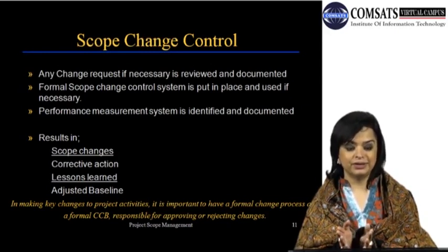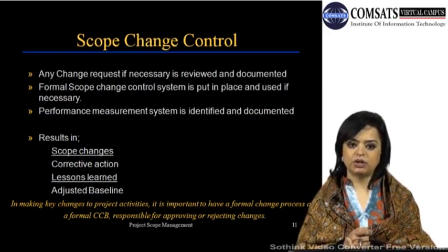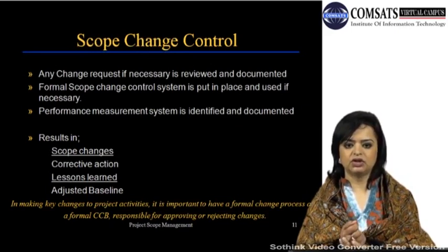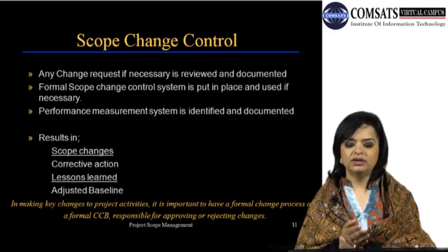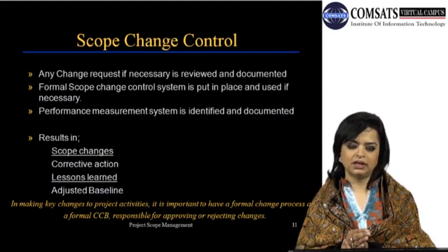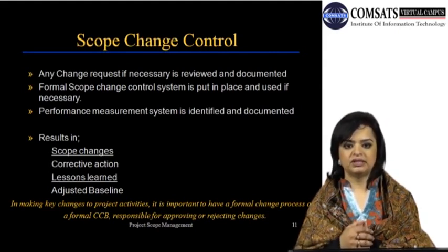All that will result in lessons learned. Maybe the change was because of just a technological upgrade. Maybe it was because of an oversight. Whatever it was, the reason for change should be documented. The change itself should be documented. If it is because of an oversight, then it goes into the lessons learned document. We're going to talk about lessons learned, and I will highlight when or at what frequency lessons learned should be done.